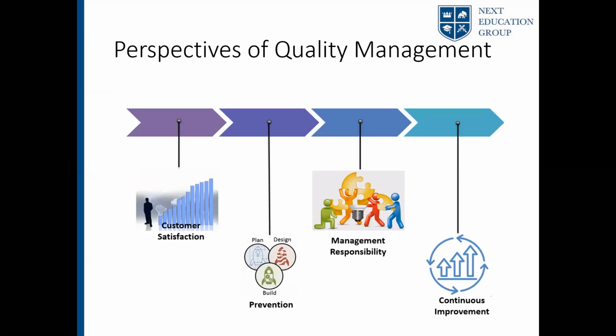Again, as I stated initially, quality is tightly coupled with scope. So quality is not just delivering the end product. It should be built in throughout the project life cycle. For example, when you are gathering requirements, you should have quality built in. Customer might say, I want a 3-bedroom apartment with French windows all around the house. But you as a trusted advisor, you as a consultant would need to give your consulting in doing what customer wants.